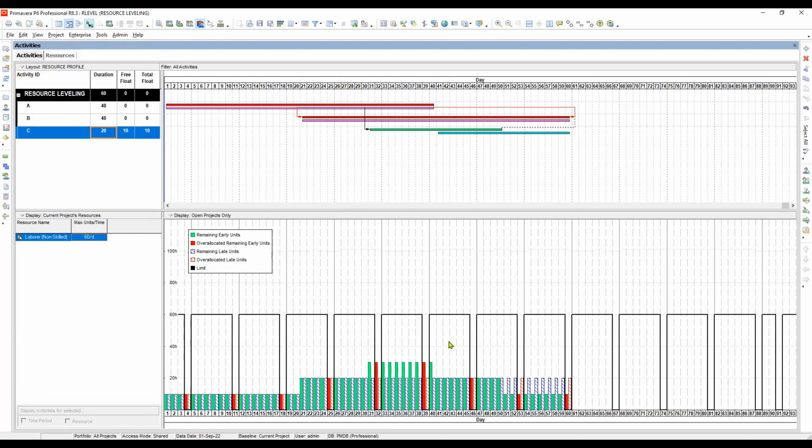Now, obviously, even though you have a contractual duration here, which is 60 days, if you look at the available resources, which is far higher than the allocation, 10, 10, 10, we can compress the schedule, right? But Primavera cannot do it because Primavera will work only for the over allocation of the project.